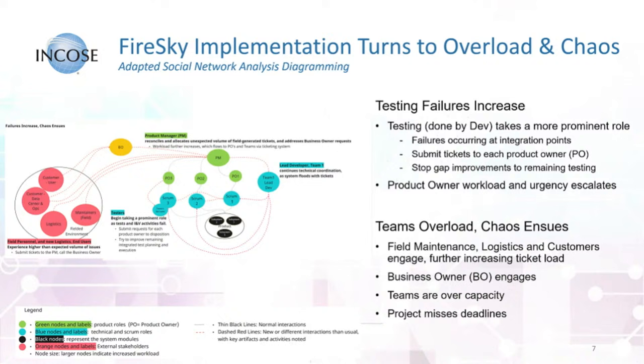And the situation was exacerbated because the original documentation from way back when the product was first created was created once and never kept up to date. So the original creators of all this software have moved on long ago, and the documentation sat there never being updated. So this team was faced with a daunting challenge with old, out-of-date documentation, and doing the best they could, they caught about 30 to 40% of what they needed to catch from an interface standpoint.